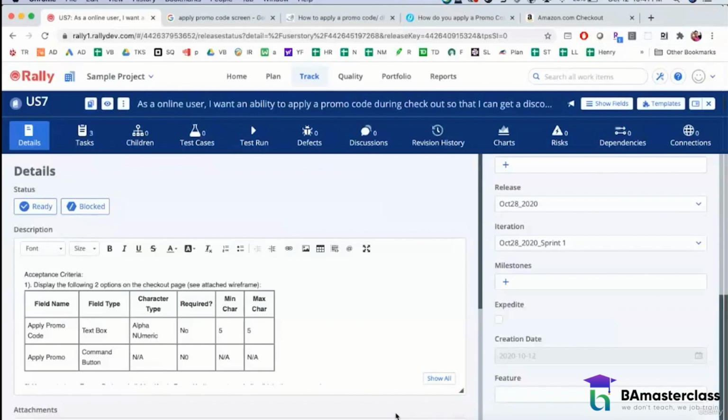So at the end of this planning meeting, you'll have probably 7 user stories. This release has altogether 14 stories. So in sprint 1, you want to deliver 7 stories. So you'll pretty much have 7 stories assigned.